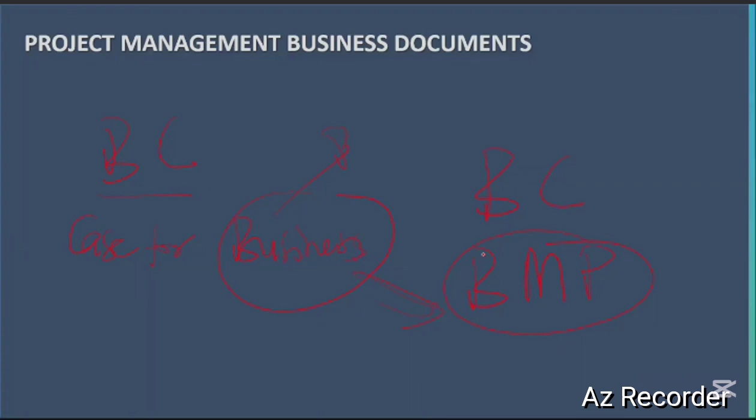And don't forget this as well, you can't make changes to the business case. You can't make changes to these business documents. If there should be changes, it should be done at some higher level. The project manager, I've seen a question like that, has not got the power to make changes in the business case. Don't forget, the project was green lighted based on the business case. So if there's a problem with the business case, remember this, the project has no validity.